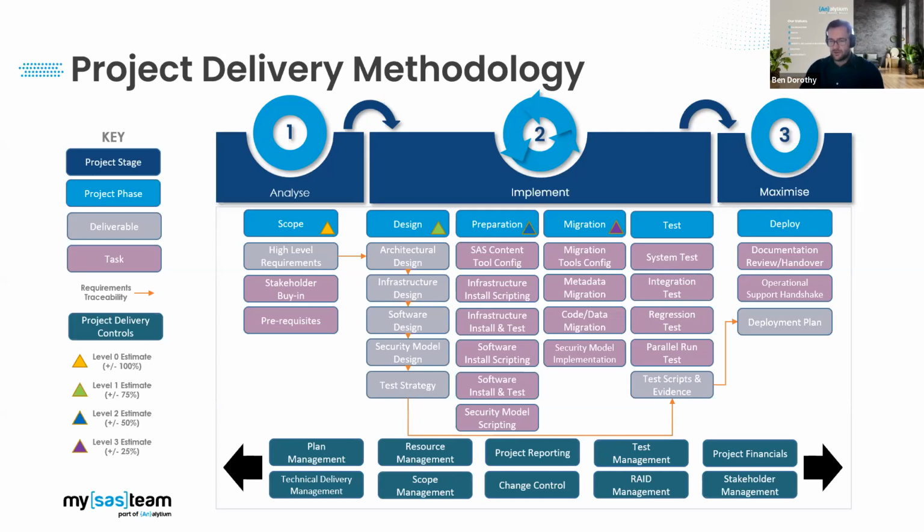activities and deliverables. So those grey boxes are some of the key technical governance deliverables we have. So requirements document flowing through the design documents we produce under the design stage, and test strategy, through to evidence of the testing and the scripts that support that testing and the deployment plans. So we provide that full traceability through those deliverables of the requirements and the components we've implemented and tested to prove a quality product's delivered. So that's the role of me, to ensure these steps are taken and built into one migration plan.